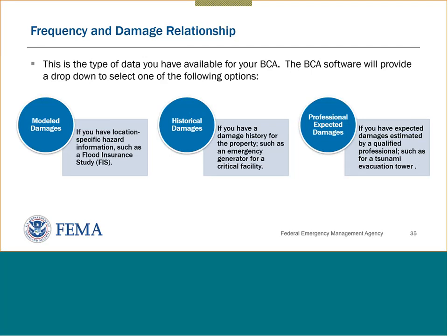One thing I want to mention that I've noticed a number of people forget is that you also need to be able to enter expected damages after mitigation. So we know that the project is to mitigate the future damages, but it's highly unlikely that you won't see some impact even after you've done the mitigation, but it'll be less.